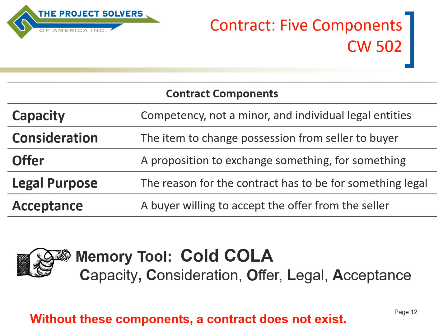And there's 5 components, all of which you need to have in place for it to be a legal contract. If one of these is missing, then you don't have a legal contract. So they all have to have capacity, meaning that you are of legal age to enter into a contract, number 1, and that you've been authorized by the organization to enter into a contract. So just because you're an employee of the organization doesn't mean you're authorized. You have to have that authorization.